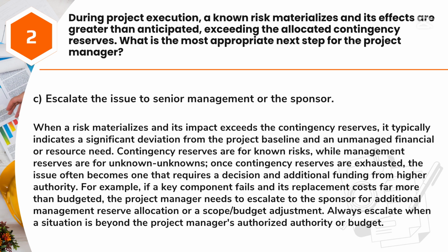Answer: C. Escalate the issue to senior management or the sponsor. When a risk materializes and its impact exceeds the contingency reserves, it typically indicates a significant deviation from the project baseline and an unmanaged financial or resource need. Contingency reserves are for known risks, while management reserves are for unknown unknowns.